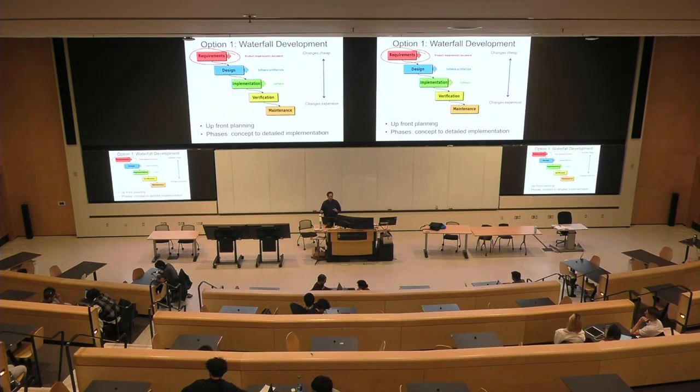So the idea of waterfall is that if you can make changes here, where you're just talking to your end users, brainstorming in the team about what this should do, they're cheap. We're just changing a specification. We haven't built anything yet. If we get into design and we figure out we need to make some changes, it's still cheaper than if we're way down in the details, where we've written most of the software and we have to go back and make some fundamental changes. So there's a logic to waterfall.